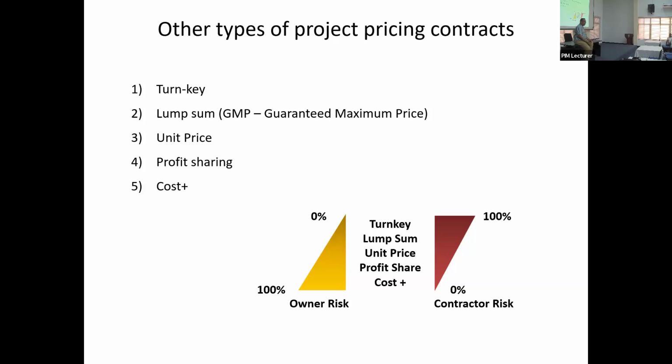If you are buying 100 tons of steel, 100 tons of steel is the same cost in Sri Lanka for everybody. It's like buying a loaf of bread. I can't sell it to you for a higher price. You can probably negotiate a little bit. That's it. So the cost element is the same. The pricing is what is different. Hope you understand the difference. Pricing is the amount you want to tender for. Some people put 10%, some people 50%, some people 2%. They want it very badly. And so on, right? So the pricing element is very important.